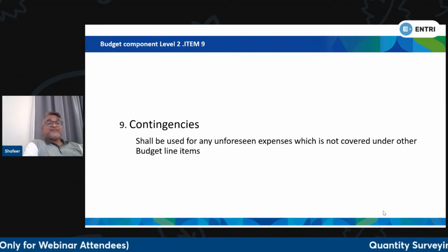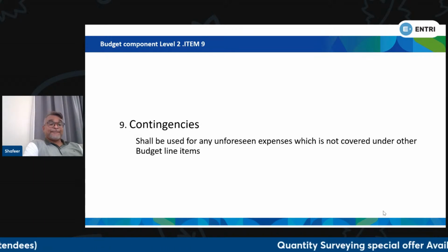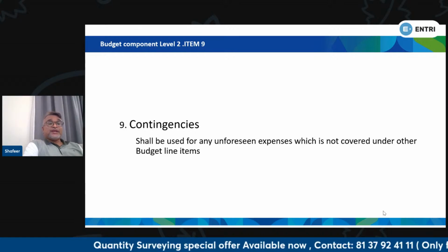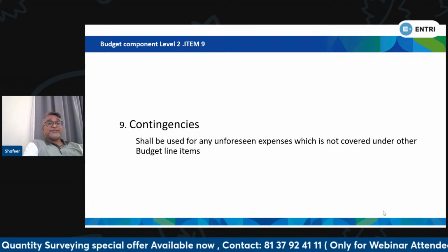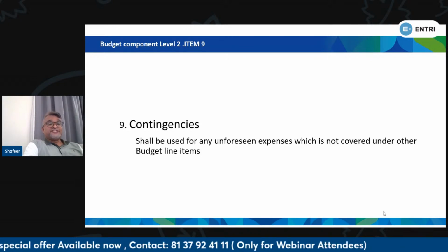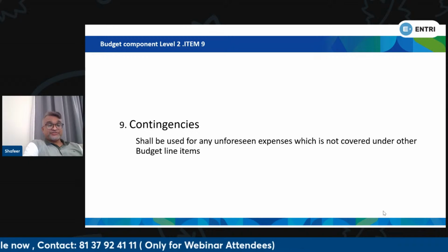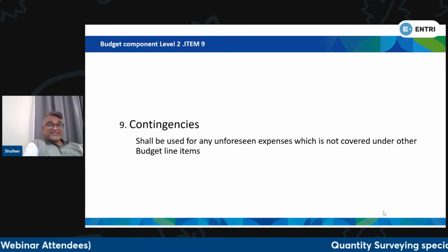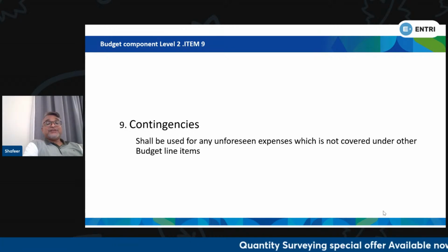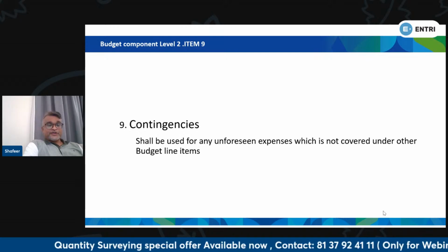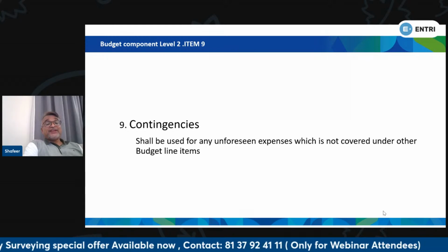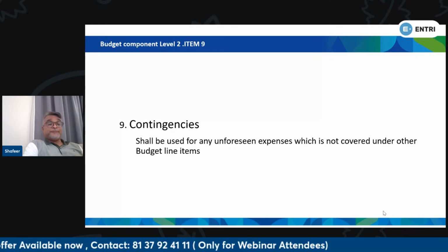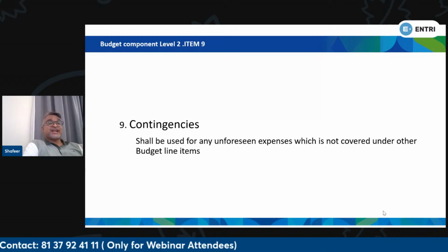Generally, this contingency has different priorities. A majority will be allocated to the construction, because approximately 75% is related to the construction. As it goes, when the contracts are realized, the contingency will be shifted to the next items which are still not completed. So in this case, we will have multiple entities managing the contingencies.